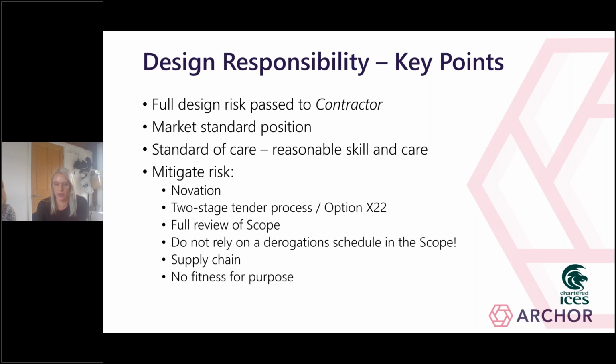If there isn't going to be a novation, the contractor should obtain a direct collateral warranty from the consultant for their benefit. The only real other solution is to employ a new design team and try and procure that design team takes on responsibility for the existing design, although that can obviously be a fairly difficult conversation.